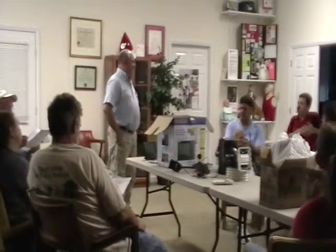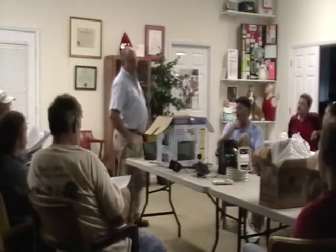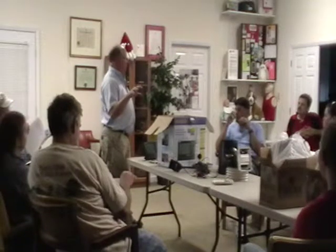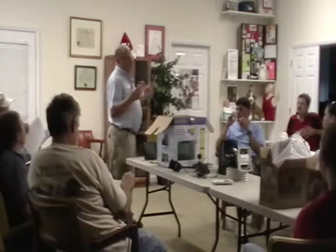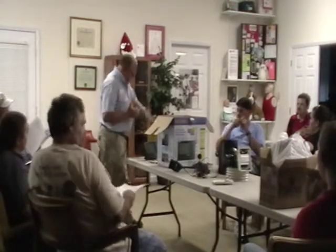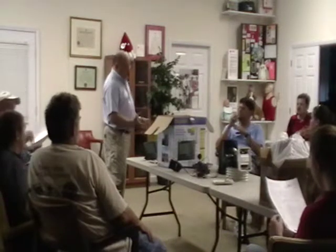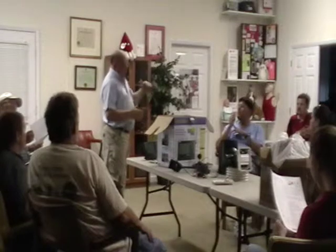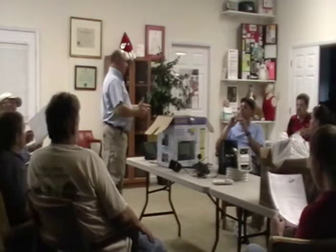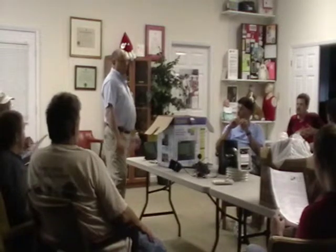Does it have a heater or anything built into that, just for freezing, the rain? This does not. You can buy the Plus, they call it, this is Vantage Pro 2 or Vantage Pro 2 Plus, and they do have some with a fan. And that's for a little more extreme conditions. But I didn't worry about that because if it's that cold, I don't care. Some of the things I'm looking for are if it gets down into the 20s at the lowest point, that's all I care about. For example, we lay bricks if it's 40 degrees and rising. So if it's 40 degrees and the trend is right, we can start work. Then if it dips real fast and there's a problem, the architect calls and he's mad at me, I say, whoa, we were within spec, it was 40 degrees and rising. So we can prove that we met the criteria for the construction industry. And so we're not interested in those extremes. But yeah, we've not had a problem with it freezing up.